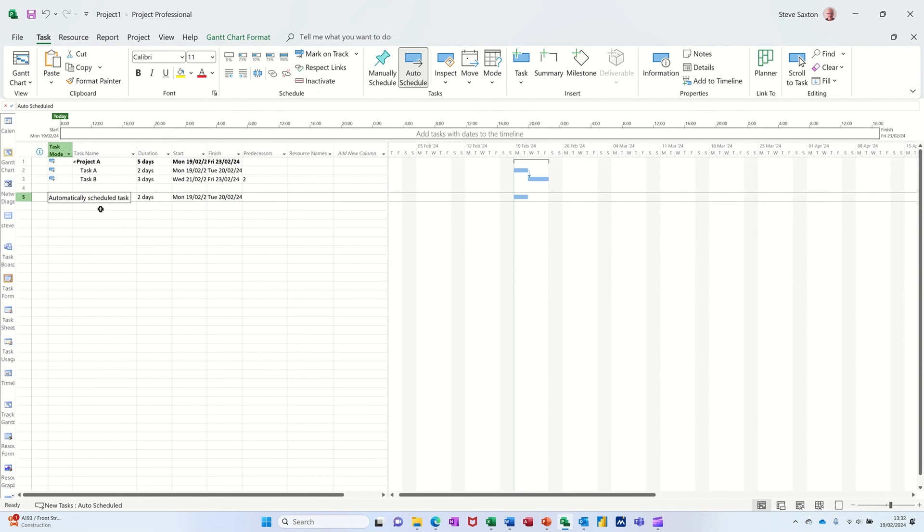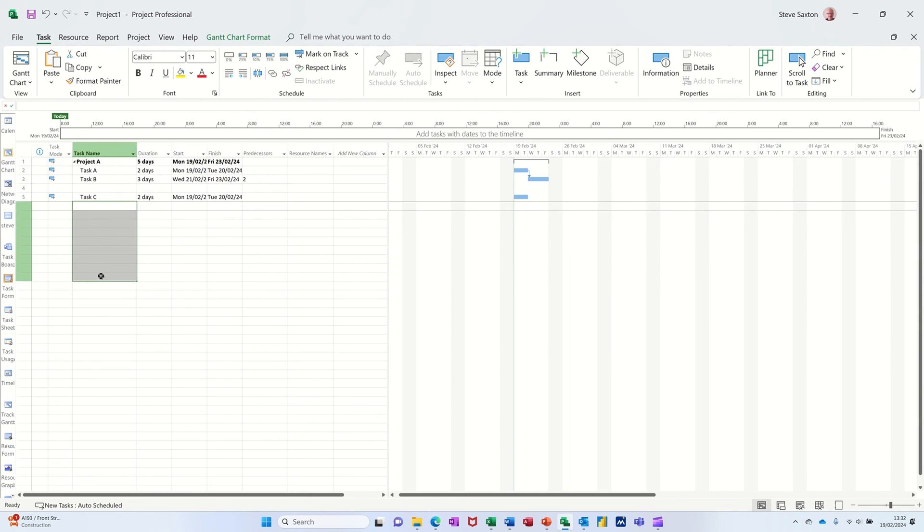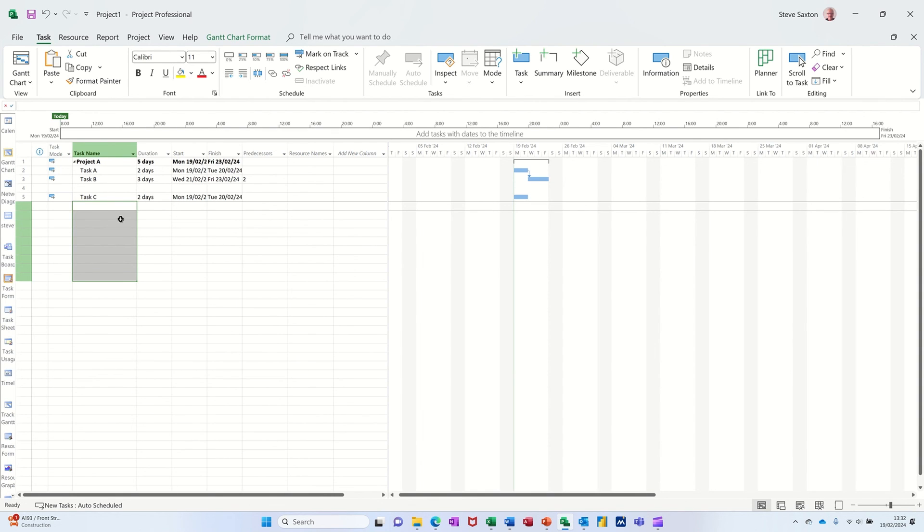If you're going to do it like this where you're putting a series of tasks in on manual, it's absolutely imperative, in my mind, that you knock them back over to auto-scheduled once you've confirmed when things are going to go. Otherwise the summary tasks and the project summary task is not going to be clocking up the timeline correctly.